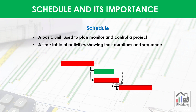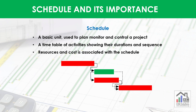Schedule is basically a timetable which shows duration and sequence of activities. Other project data like resources and cost is also associated with this schedule through its activities. This means that a schedule helps in resource and cost planning of the overall project and also their monitoring and controlling. Also, change or delay in the activities may affect the resources and cost associated with these activities, which needs to be re-planned through the schedule.